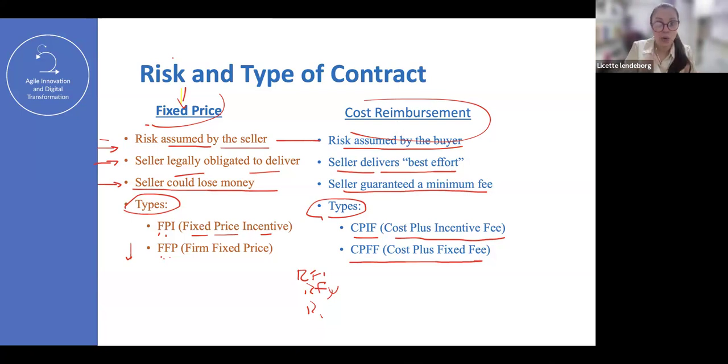In that case, I'm going to track my extra hours, like an addition. So that is cost reimbursement. And I'm going to put, okay, I paid for my lunch. That is a cost. I paid for my transportation, like $20 for Uber to go to the library, whatever it takes. You know what I mean? So that is cost, right?